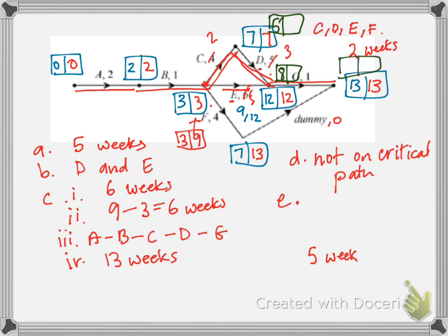And then our final activity, G, is 1. So our new minimum time in weeks to complete this is going to be 9 weeks. And I'd already put this 5 weeks, the amount that we reduced the activities in total. And we were told it would cost us $275 per week that we crashed those activities.